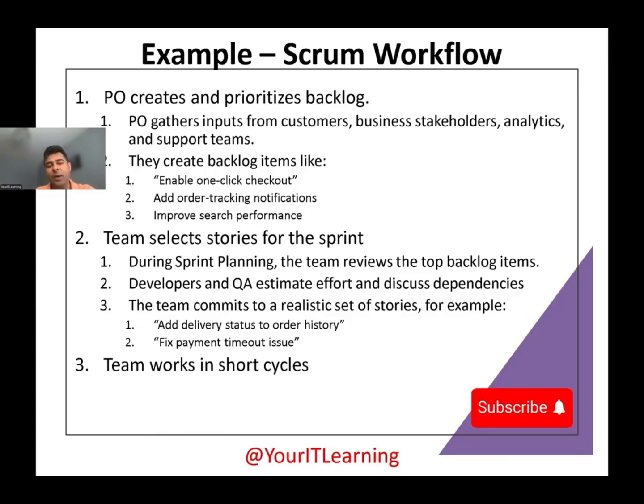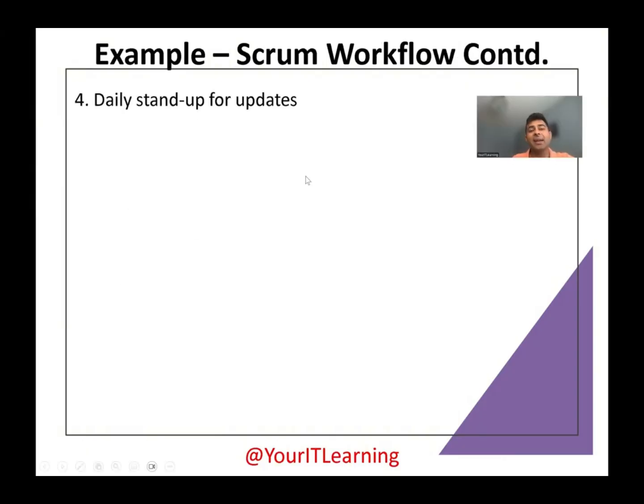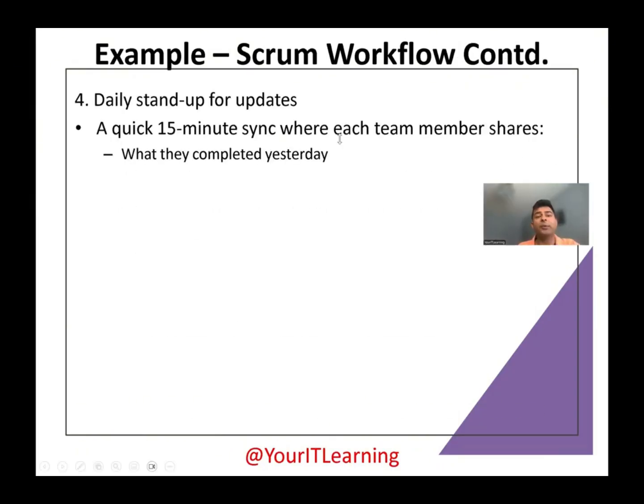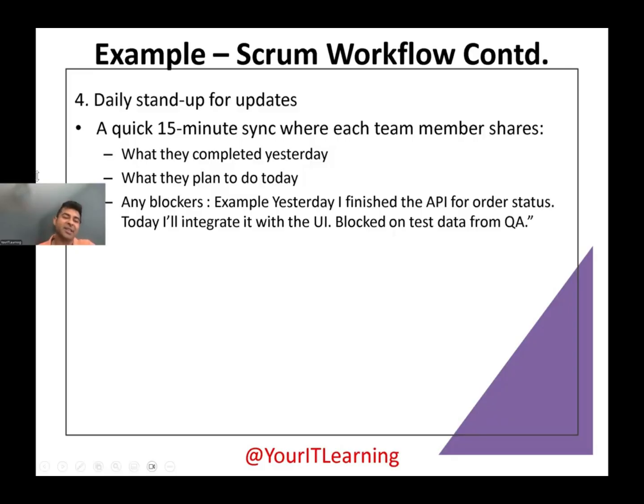Team works in short cycles. The team breaks stories into tasks like API updates, UI change. Daily stand up for updates. A quick 15-minute sync where each member shares what they completed yesterday, what they plan to do today, any blockers. Example, yesterday I finished the API for order status. Today I will integrate it with the UI, blocked on test data from QA.